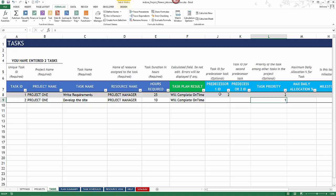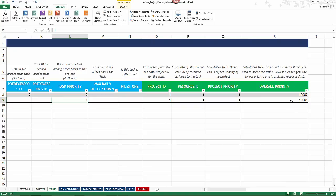This applies to multiple projects as well — circular reference errors will occur if there's a priority and predecessor conflict across multiple projects. To see the priority the template uses for scheduling, check the last column: Overall Priority. Don't edit that calculation — it shows the order tasks are prioritized, with lower values indicating higher priority.